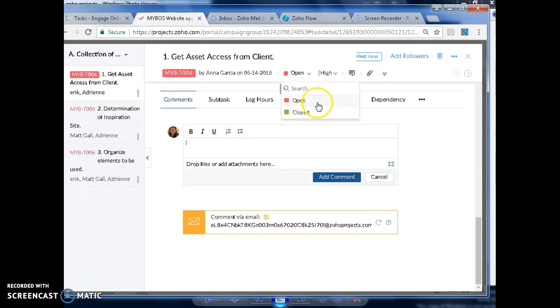Okay, so make sure that you close the task if it's not needed, and put the comments on there to communicate with the person who created it, and make sure to, of course, close it. And if you're finished with it, make sure to close it too, because the Gantt chart is not going to work if you're not going to close the tasks. Okay, it's going to appear there forever unless you close it.